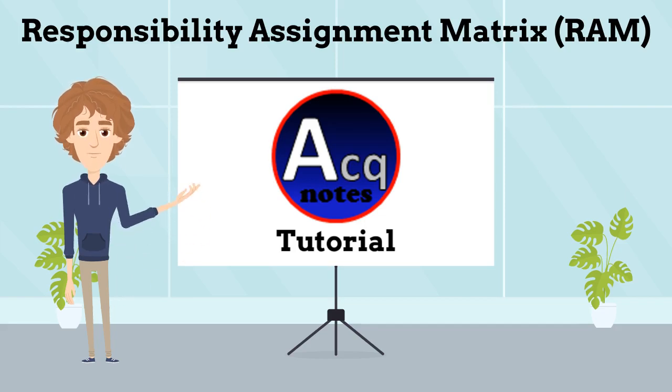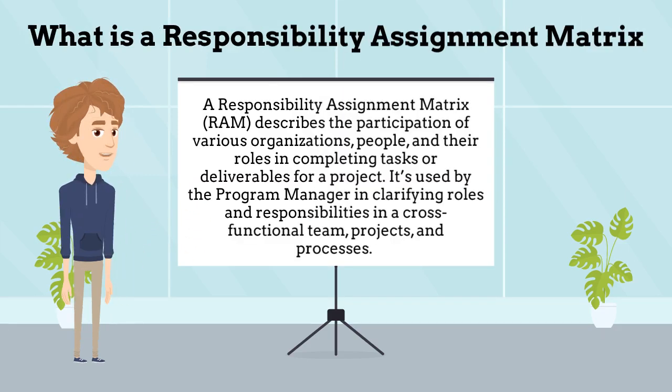My name is Bert, and I am going to give you a short tutorial on the Responsibility Assignment Matrix. A Responsibility Assignment Matrix, RAM, describes the participation of various organizations, people, and their roles in completing tasks or deliverables for a project. It's used by the program manager in clarifying roles and responsibilities in cross-functional team projects and processes. A request for proposal might request a RAM from a contractor.